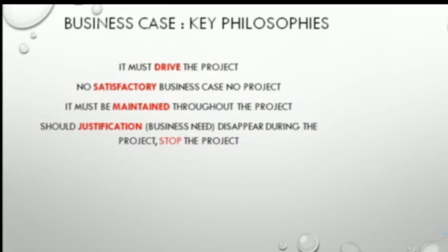Then also they say no satisfactory business case, no project. Once you find out that your business case is not satisfactory enough, you're not optimistic that this business will meet up the desired benefit, or this project will give the desired objective, maybe as a result of the risk that you have assessed, you've gone through the risk and you've seen that the risks are very high. You understand? So there is a tendency that this business might not come out the way you want it. Once you start having doubt over the objective of that project, or not attaining the benefits of that project, it should not be embarked upon.